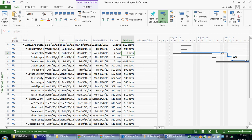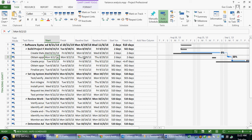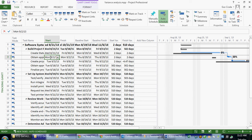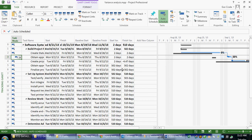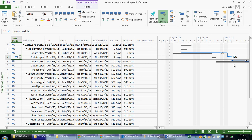If we go to the next task, we can see that it was scheduled to start on August 29. It's now scheduled to start on the 2nd of September, two days late. Same true for the finish dates. Note also there's a view called the Tracking Gantt. What the Tracking Gantt shows us is the difference between the original start date and the current start date. So we get a visual cue when things are tracking on or off schedule.